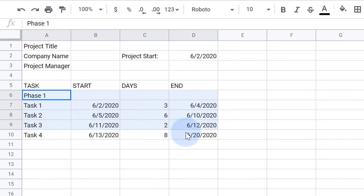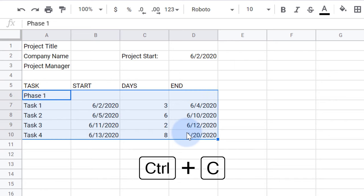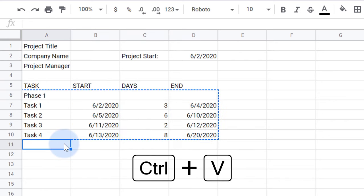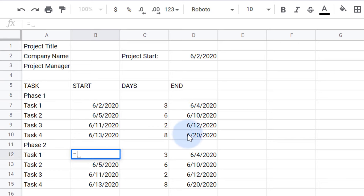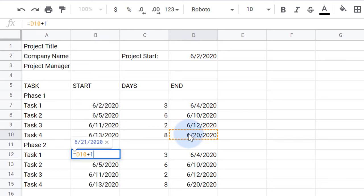I'll copy these formulas down to create a second project phase. I'll make phase two start one day after the final task of phase one.